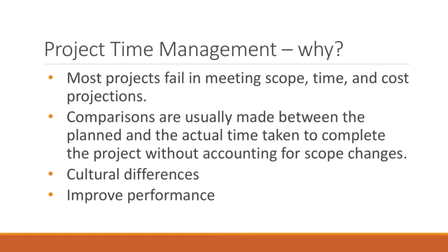Project time management does not limit itself to just doing proper planning of what the timing is going to be in a project. It's more about the overall idea that I've been trying to talk you into: you need to account for possible issues that you might run into in your project and try to circumvent or prevent these issues, either by estimating longer time than you expected, or by adding in time buffers in different places within the methodology or the sequence that you are working with.